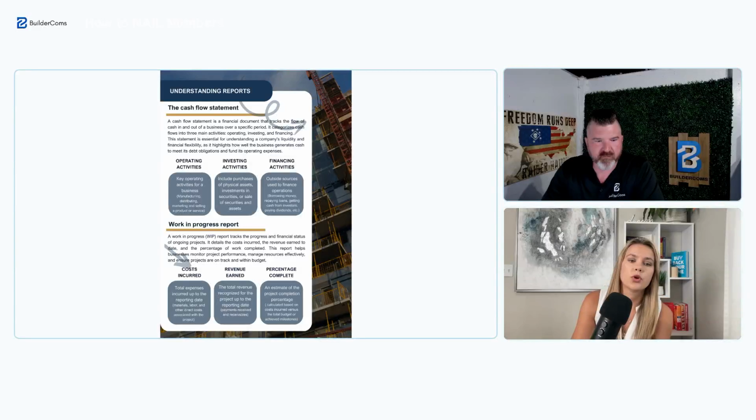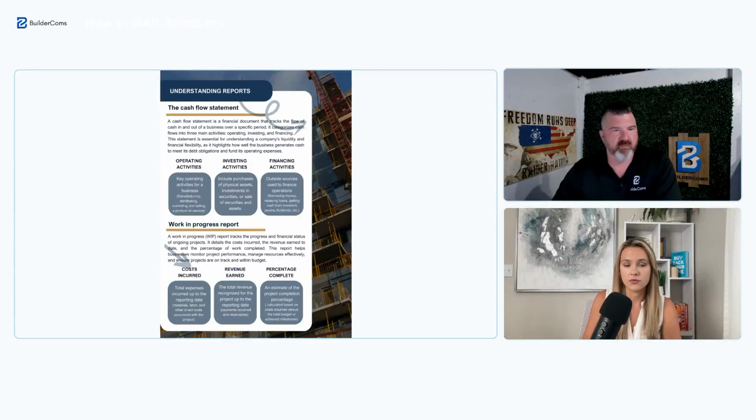And of course, work in progress reports, that is for people who are doing work in progress accounting. But in a sense, even if you're looking at just work in progress as you're moving along with the projects and you're tracking everything live every week and you look at the reports, okay, we poured the concrete, okay, we did the framing. Let's see if we're over budget, under budget. Where are we at this phase of the project? That would be extremely helpful.